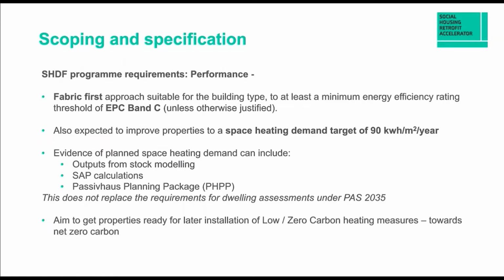These things aren't going to prohibit the next stage. And the final part of that equation would be you reduce the demand, put in your heating systems, and then put in your renewable energy generation systems as well, to aim for a low or zero carbon development at the end.